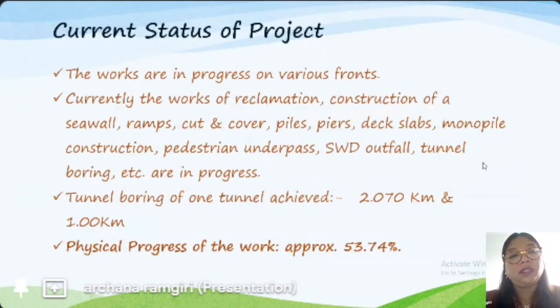Current status of the project is, the works are in progress on various fronts. Currently, the work of reclamation, construction of seawall, ramp, cut and cover, piles, piers, deck slab, monopile construction, pedestrian underpass, SWD outfalls, tunnel boring, etc. are in progress. Tunnel boring of one tunnel is achieved, and for another tunnel, 1 kilometer we have already achieved. Physical progress of the total work is approximately 54%.